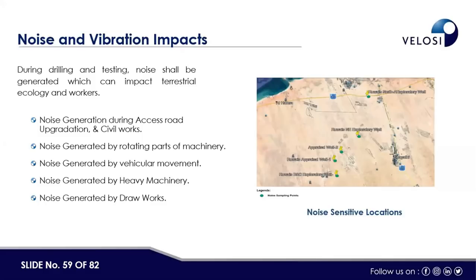For example, if previously an EIA was carried out for that particular project, then you should have that EIA as well, so that you can describe the baseline and sensitive receptor locations in the construction environmental management plan, and the rest is your site visits that are required, so that you can see the nature or the location of the project, and accordingly you can develop the CEMP.